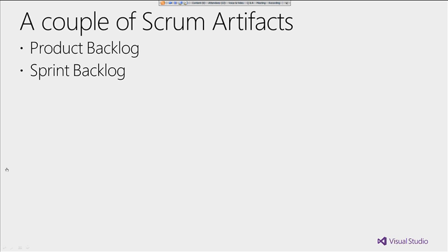So it's very generic. Now, the sprint backlog, on its side, is a subset of the product backlog items selected for the sprint. It also has a plan for delivering the product increment. When I say a plan, I mean that you take those product backlog items and break them down into tasks as you move into the sprint. Well, then let me show you here what these two are, and then I can talk about the events themselves.